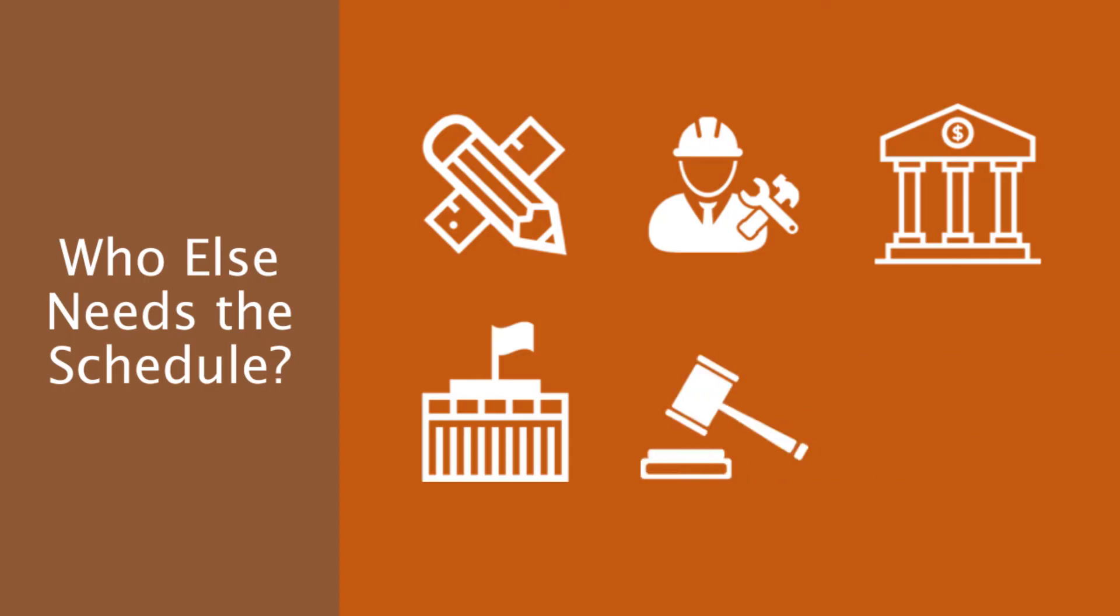Also the government licensing for licensing and permitting, legal consultants, attorneys, and other—all the project parties need to have an idea about the project, not at the same level of details. Of course, the party that needs the detailed schedule is the contractor and then the owner.